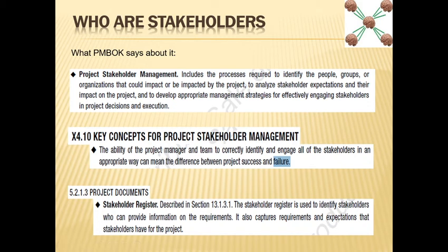That is why in the project charter you should have a list of items which are part of the project, and a very clear list of items which are not part of the project, because stakeholder expectations, if not managed properly, bring a lot of scope creep into your project. So you should know what is in the project and what is out of the project.